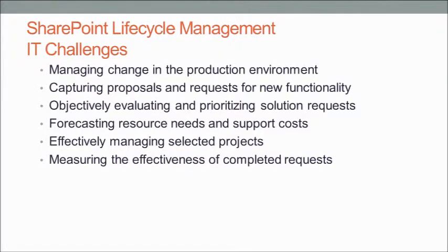So many of our projects never quite get to the end. We don't really sign them off in a way that we want to do. We don't get the users to sign them off and actually say, yep, that met my requirements. We sort of say, here it is, and I hope that they're not going to come back to us and ask us difficult questions in 2 weeks' time. And actually, finishing things is really, really important, because otherwise, how can you really judge yourself? The fact that you think you finished doesn't mean to say you really have. And if your internal customers aren't entirely satisfied, actually that's a problem, and you just don't know about it.